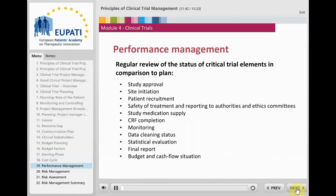Supervision of the trial while it is carried out is another central aspect of clinical project management. At different stages of the trial, the elements to be supervised change. At the beginning, the focus must be on getting trial approval as rapidly and smoothly as possible in all countries, getting the study medicine to the sites, providing all necessary information, training, equipment and documentation, and preparing for site initiation. During study performance, the focus shifts to recruitment rate, monitoring activities, CRF completion, study medicine supply, and the occurrence and reporting of serious adverse events.